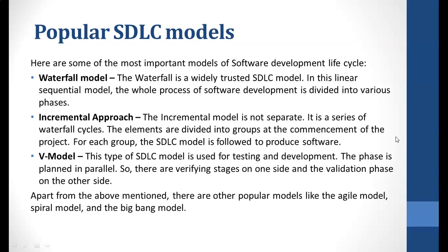Incremental approach. The incremental model is not separate. It is a series of waterfall cycles. The elements are divided into groups at the commencement of the project. For each group, the SDLC model is followed to produce software. The V model, this type of SDLC model is used for testing and development. The phases are planned in parallel. So there are verification stages on one side and the validation phases on the other side.